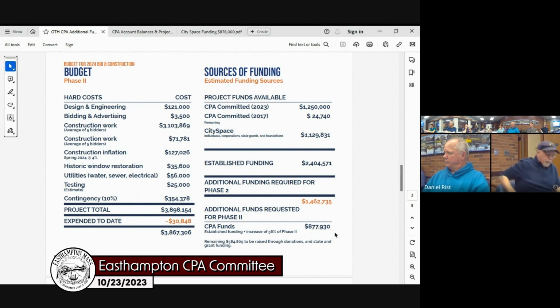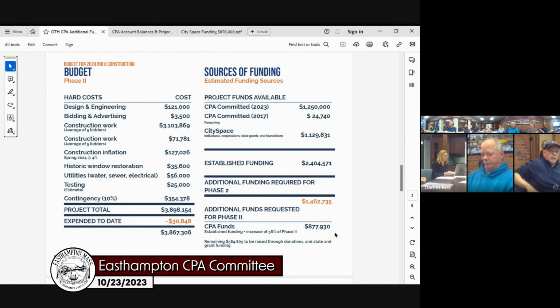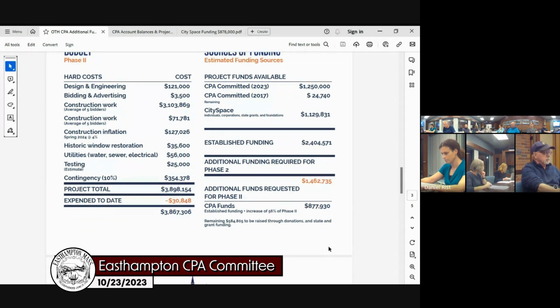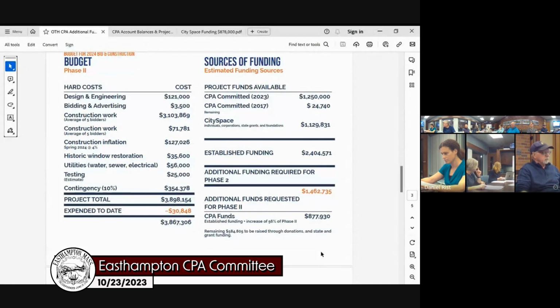Yeah, so we're looking at an increase in the project, as Councilor Rist said. We went out to bid in May and June and saw a good amount of bids come back from the sub-bidders and the contractors for the project. Unfortunately, the lowest bid was much increased beyond what we had originally anticipated for the $2.29 million project. The lowest bid was from Kiter. We had about 5 bids that came in for the contractor. A couple of sub-bidders did not bid in their particular fields, so those areas of expertise went over to the contractors. So the contractor had to increase their prices for the overall bid.